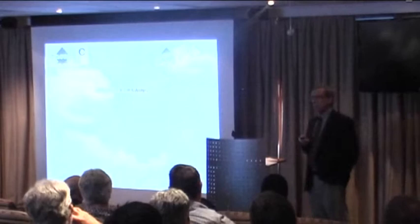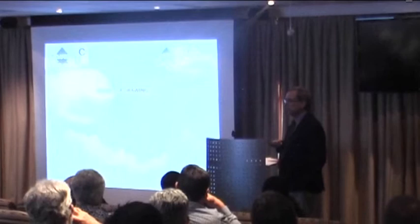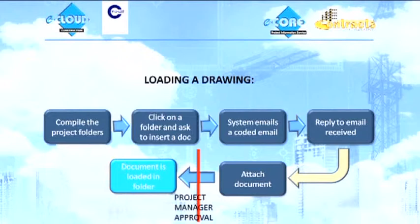I just want to explain how simple it is to load a drawing. Because this is where I think the system starts to come into its own relative to an FTP site. You compile the project folders. This is effectively the drawing register that an architect would normally use, or any professional. You click on a folder and ask to insert a document. A folder is a drawing. So, site plan. You click on site plan. You say, I want to insert a drawing. The system emails your coded email. You attach. You reply to the email. You attach the document. There's a project management approval process which is optional. And if he approves it, it goes into the right folder as a new revision. That's it.